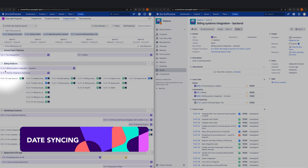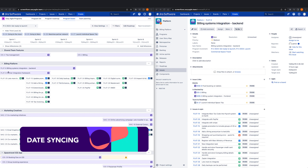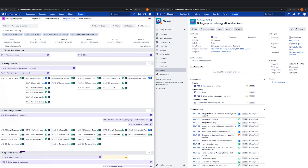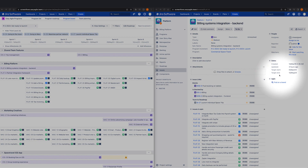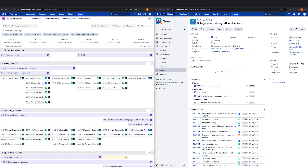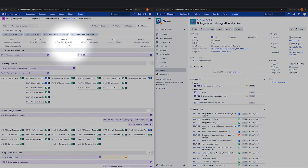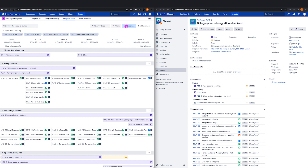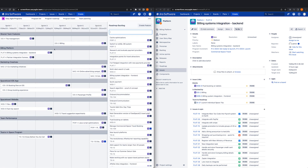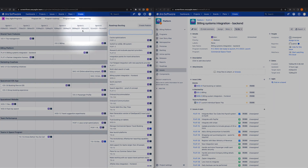If date syncing is enabled for your program, when features are scheduled or rescheduled in Easy Agile Programs, these date changes are reflected elsewhere in JIRA. This means date changes are synchronised between Easy Agile Programs, Advanced Roadmaps and your source issues in JIRA. The plan created for the quarter, during PI planning or otherwise, then becomes the single source of truth throughout execution as well. When features need to be rescheduled to address any blockers or conflicts, these will be auto populated on your roadmap and auto updated, meaning less manual work for the manager of your program or release train engineer.